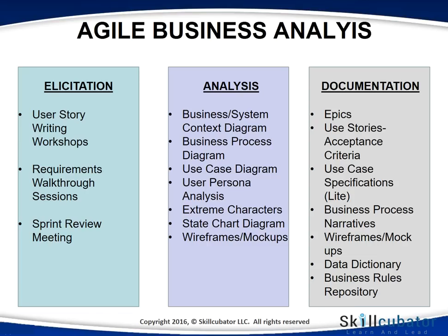The first one is user story writing workshops. What will happen is you as a business analyst will work with the product owner and write these user stories, acceptance criteria, identify the hidden stories, split the big epics into small stories. Everything will be done in these workshops. You along with the PO will do it on a continuous basis, and you need to set some cadence, once a week, twice a week, depending on the complexity and the duration of the project. You may want to set that cadence so that you can have a constant grooming of the product backlog.